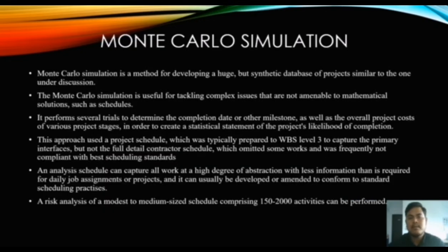Okay, now I would like to explain about the Monte Carlo simulation. Monte Carlo simulation is a method for developing a huge but synthetic database of projects similar to the one under discussion. The Monte Carlo simulation is useful for tackling complex issues that are not amenable to mathematical solutions, such as schedule. It performs several trials to determine the completion date or other milestone as well as the overall project cost of various project stages in order to create a statistical statement of the project's likelihood of completion.